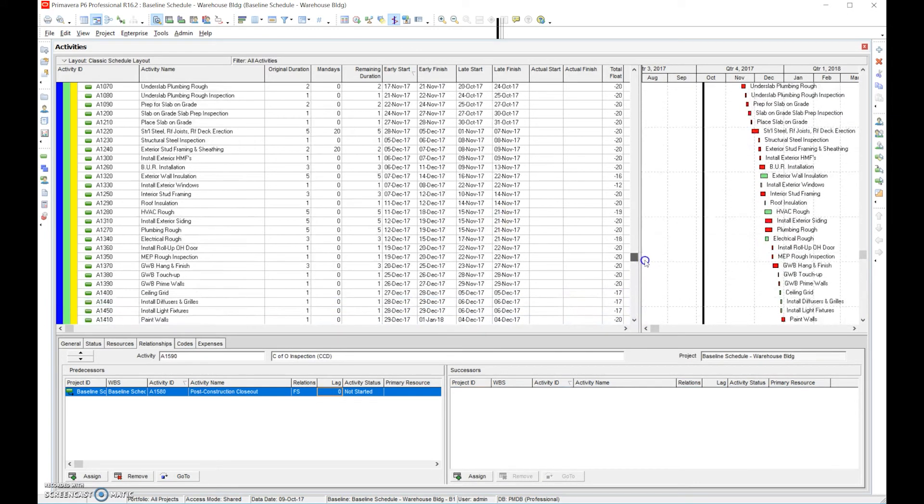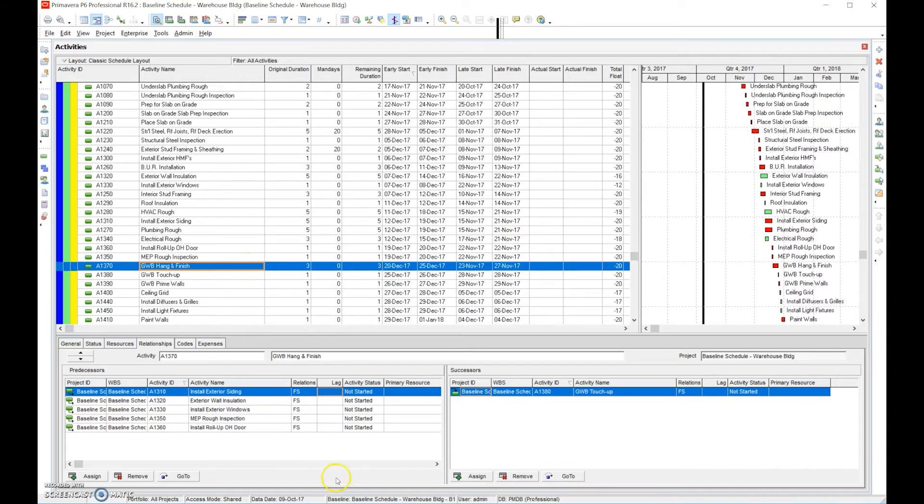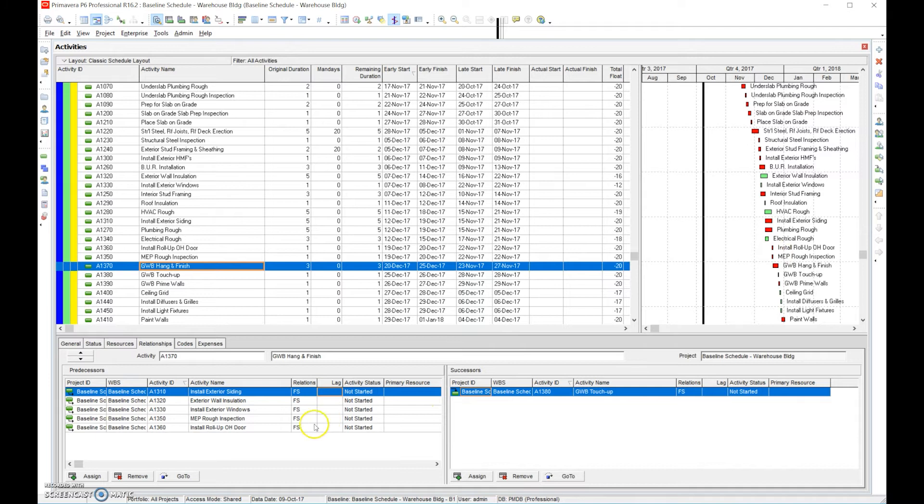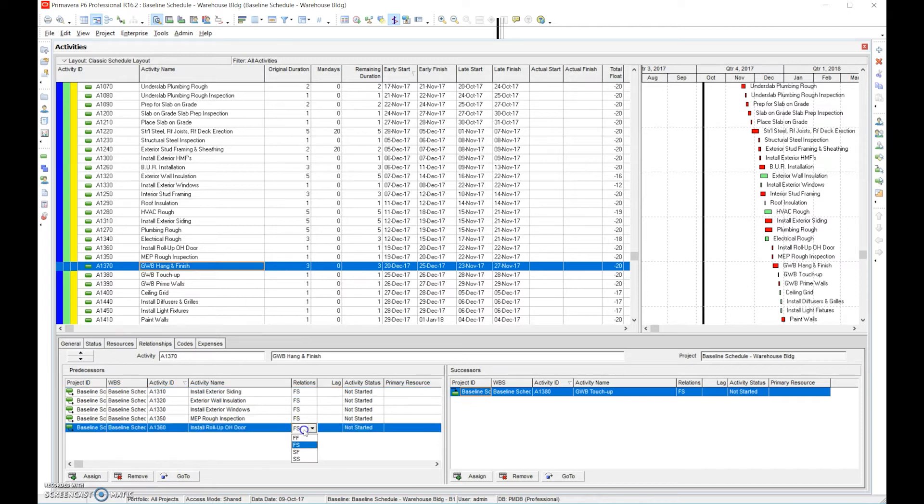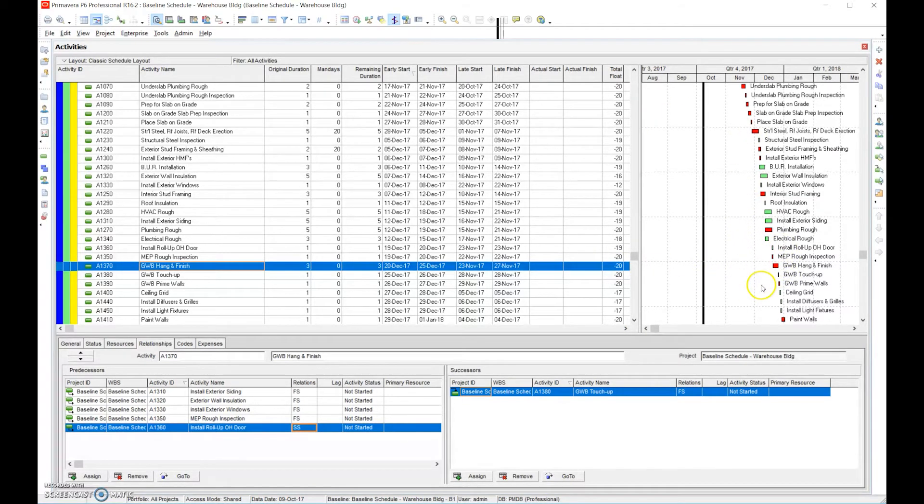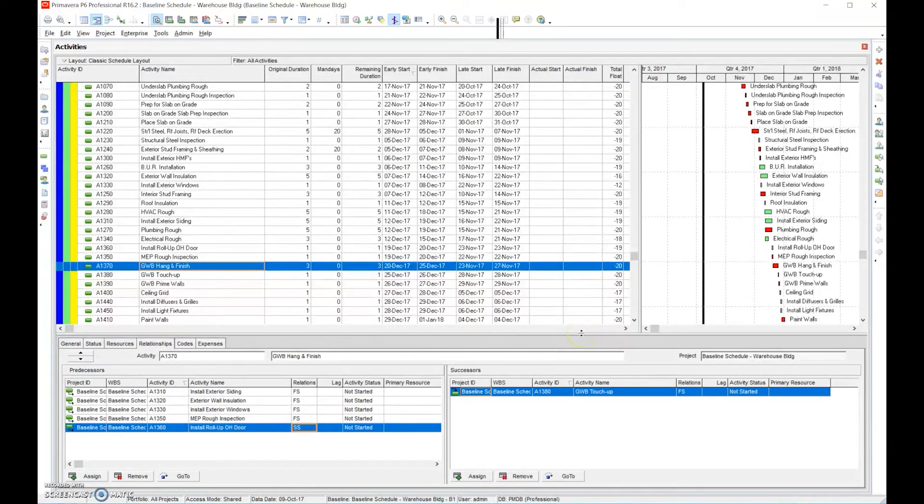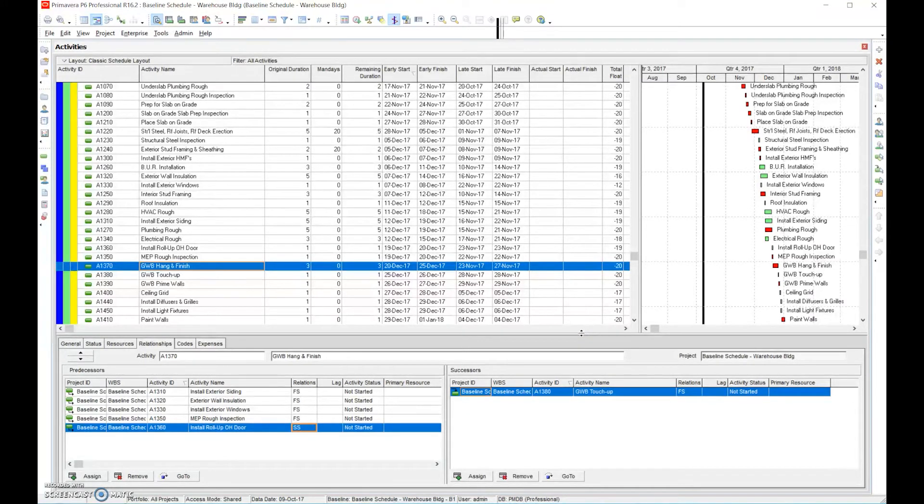Drywall hang and finish, right? Now see, this has multiple different relationships on it. So we can say, okay, what's pushing it? I think it's either MEP or rough and overhead doors, right? So do we need to have those done before hanging drywall? Yeah, for that, but not for rough and overhead doors, but we can change the relationship there. It changes the critical path but it doesn't change the float, right, the negative float. So we're going to go through the schedule again and again, changing relationships, reducing durations by adding additional manpower or other means.